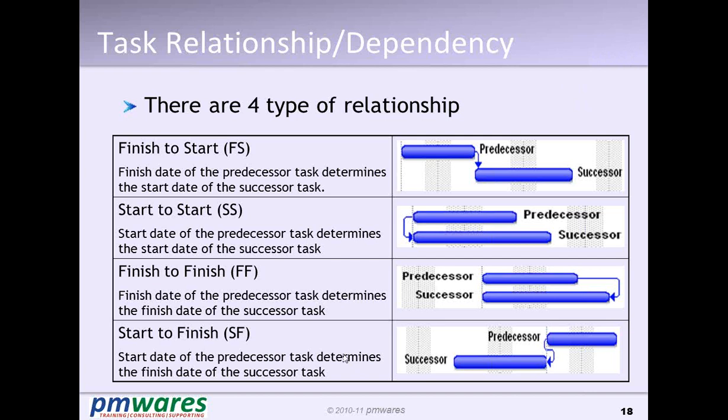Okay, so to repeat what we have done as of now: we change the options first, and then we set up a calendar for the project, give a start date and select the project calendar, and also decide whether we're going to do forward planning or backward planning. Then we define the scope of the project, and then we enter the estimates for all the leaf tasks, that is the activities. So we give the estimates to the activities.